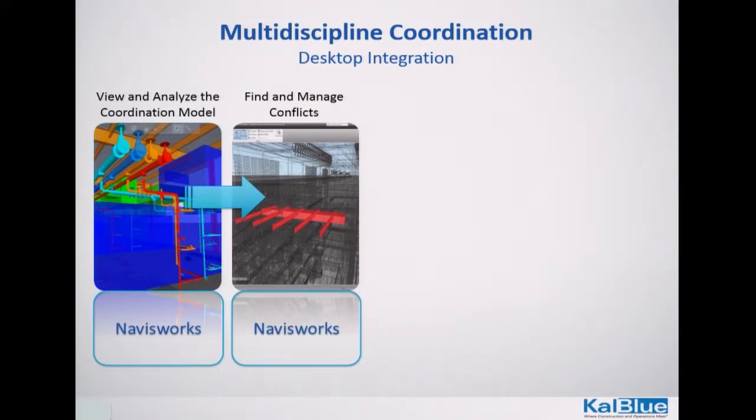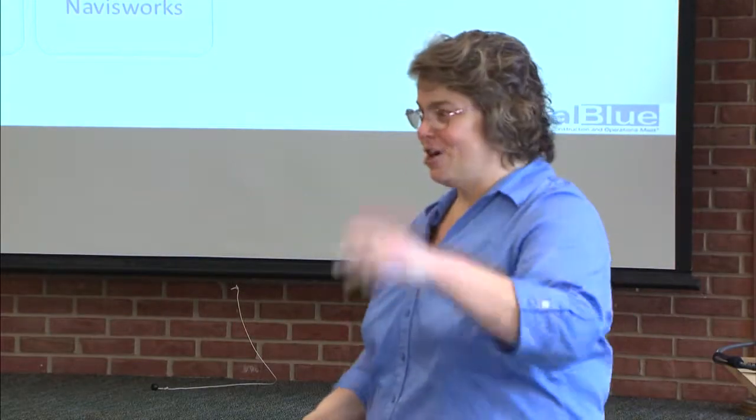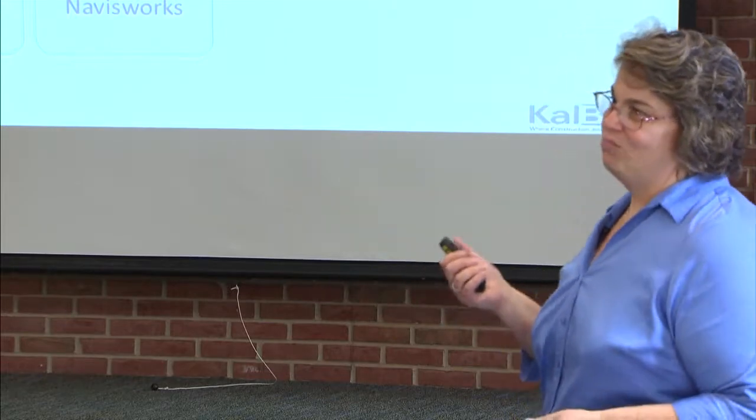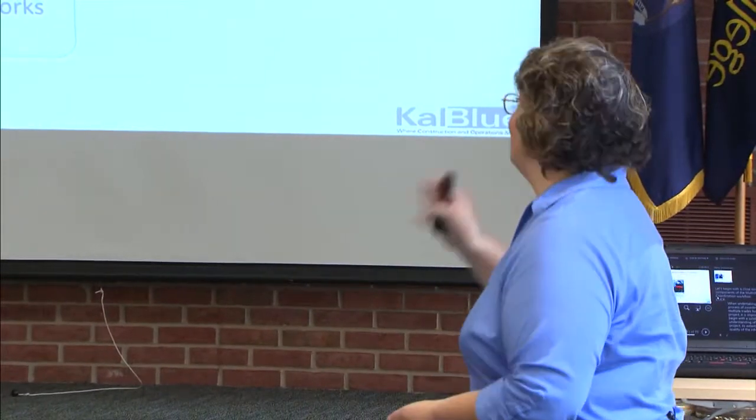In Simulate you can also find clashes, but it's a manual process. Excuse me. It's you basically walking through. And I've done it. I've found all kinds of amazing stuff just walking through a model, which I have, and I'm going to pull that up. But being able to just get up into the ceiling, seeing the duct and the pipe, and you've got a duct going right through, whatever, a steel beam. Yeah, no, that's probably not going to work very well. So you can visually just walk through and find the issues, tag them, save a viewpoint, print it out, and say, yeah, this is a problem. Send it off to someone. You need to fix all this stuff. You can do it in Simulate. Manage has the automation where you can set tolerances and all that information and have it print out a full report.